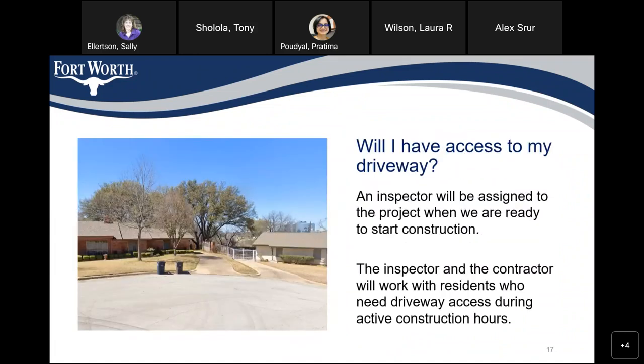Will you have access to your driveway? An inspector will be assigned to the project when we are ready to start construction. The inspector and the contractor will work with residents, as we need driveway access during active construction hours.